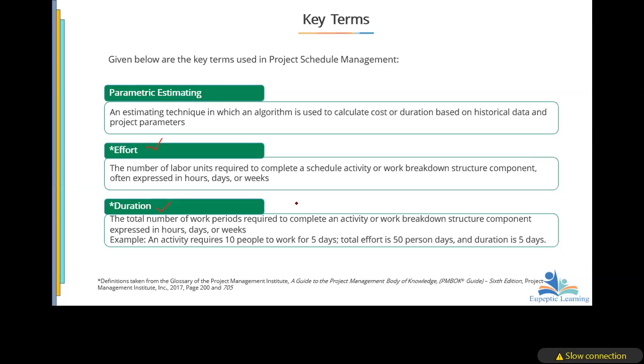So if we say a project is taking 20 days, we are taking weekends out. And of course, holidays are dependent on where you are. 6th March is a holiday in Ghana, but it's not a holiday if you are in, let's say, Nigeria. So as for those public holidays, it depends. But typically, weekends are not days of work for the project manager, and you have to respect that. They can test you on it. Now, if you want them to work over the weekend, there has to be an agreement. If they say no, you cannot force them.